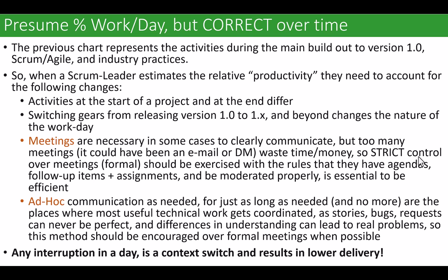Meetings are good and useful and sometimes required, but you better be able to articulate the purpose and desired outcome of the meeting in 2 sentences. The purpose of the meeting is X. The outcome that we expect is Y. Generally, the purpose of the meeting is to communicate status or problems, and the outcome of the meeting is that deviations from status and problems are identified and assigned to someone to help fix them.